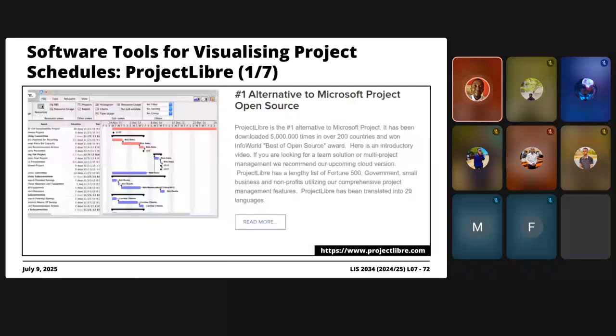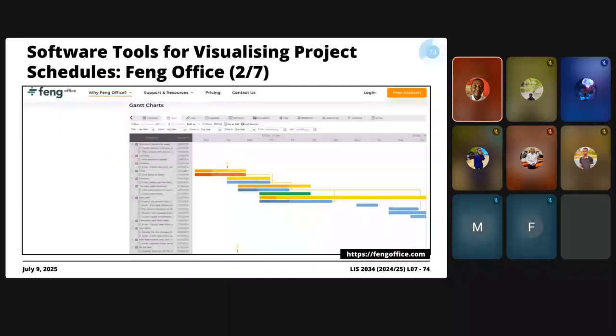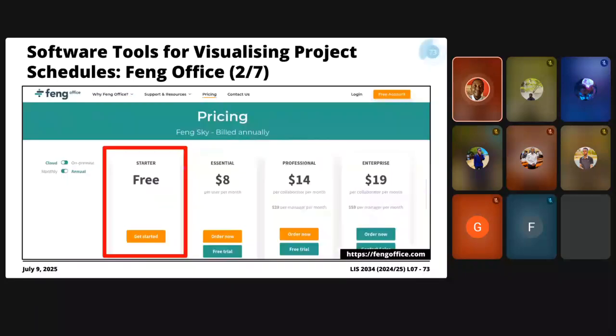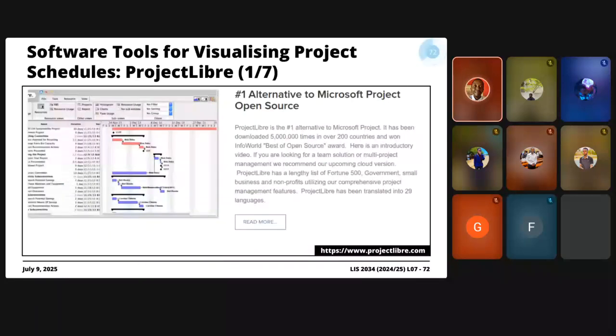In as much as the aesthetics are different, the fundamental idea is the same. On your y-axis, you have your tasks. On your x-axis, on the top, you have your time. Depending on the sheer size of the project, this time could be segmented in weeks, months, quarters, or even years. Also, you'll notice your 0,0 is on the top left corner, ideally.